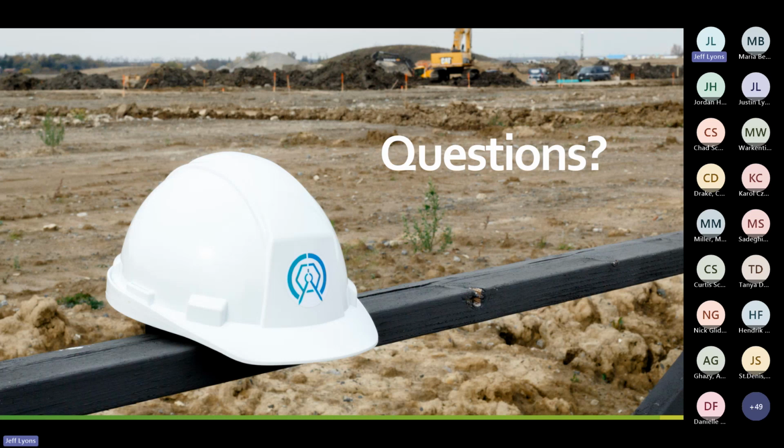If there's an item code system that you have, then it's no big deal. You can just match it. If you don't have an item code, then you're going to have to look at the way you built the tender or the bid, and then try and make it so there's a unique identifier there. So there's some tricks there, but generally, you're going to have to add about a year's worth of data to get something out of it. I don't know if that answered it or not.